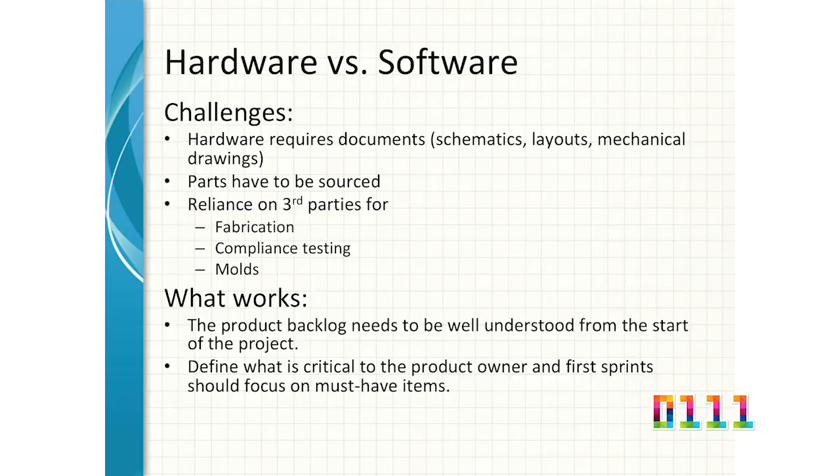Okay, hardware does require documentation. It requires schematics, layouts, Gerber files. You have to do fabrication and so on. So you have to source the parts. You rely on third-party test houses to do your compliance testing, to do your fabrication. Molds, plastic molds. Well, you can't build plastic molds in 2 weeks, can you?